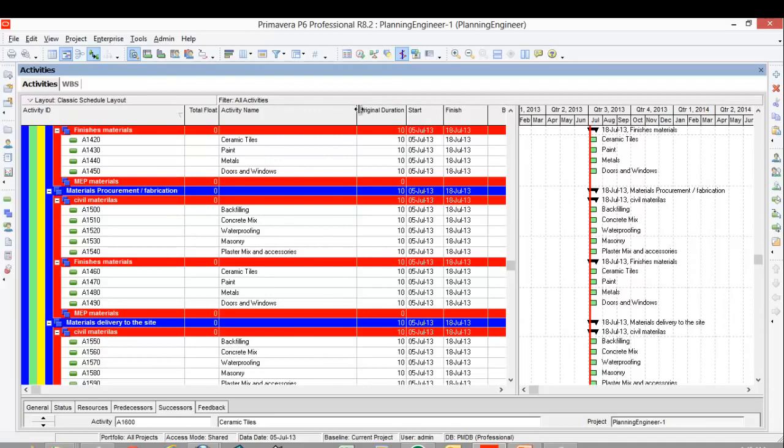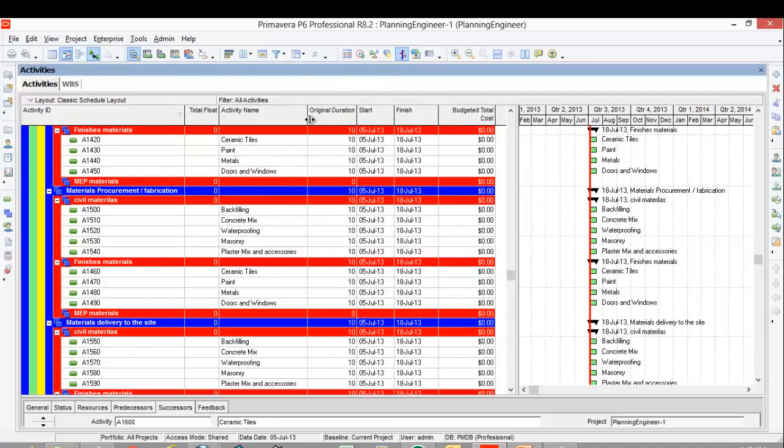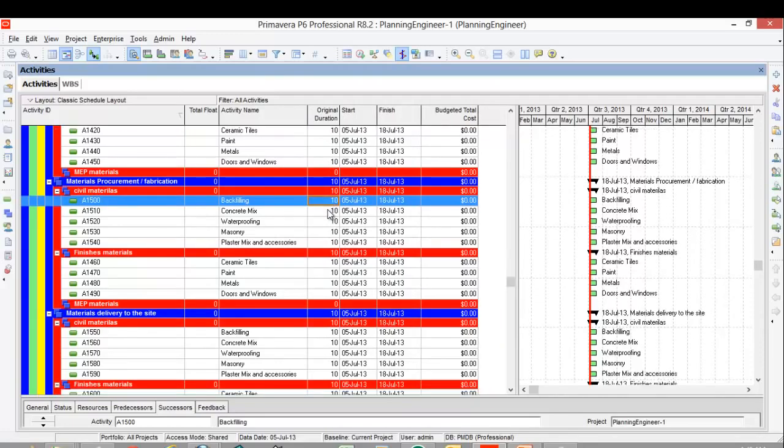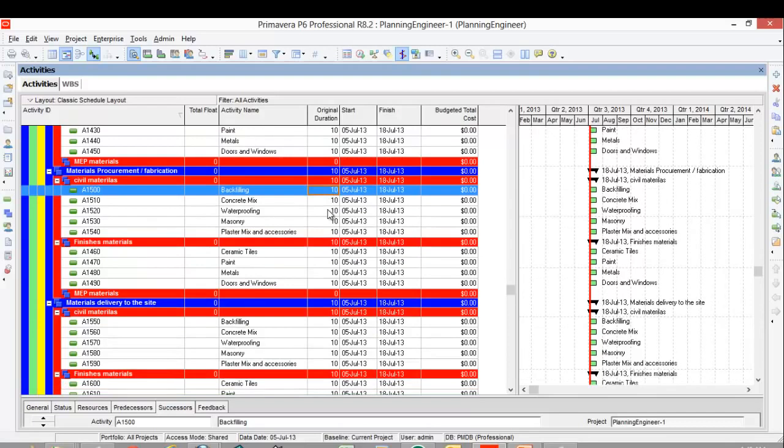This is very, very important and could impact your dates, because if you have any long lead materials. So for now, I will assume some dates, and in reality, I'm assuming these dates as well. Then I give them to the procurement department to confirm, or if I already have the information, I put it directly here.